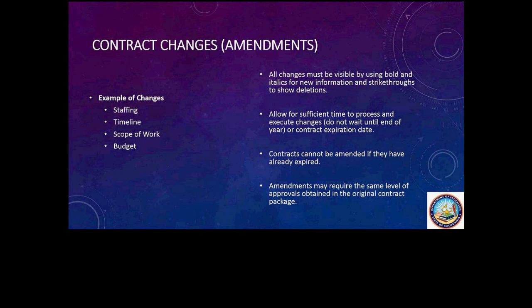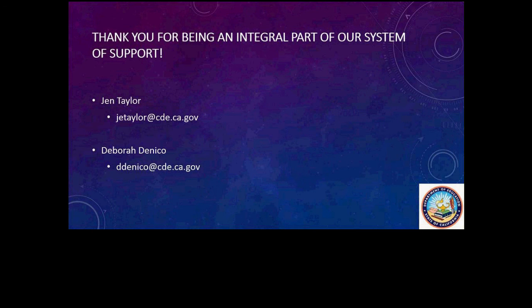Good afternoon. This is Deborah, and we had a question asking how soon after the end of the fiscal year is the withhold released to the CDE. Typically, that withhold, provided with the fourth quarter invoice we've received all of the reports, will be processed in 7 to 10 business days from the last quarter invoice being submitted. Typically, I send an email to the contractors that I support and let them know that the 10% withholding has been processed and for them to expect it.